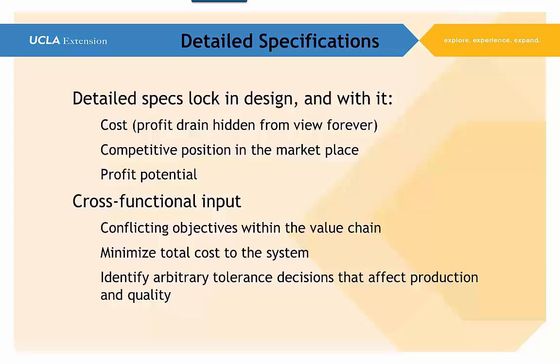What we need to do is make sure that if we're going to make any kind of decisions regarding production or quality or the service, for instance, a decision might be a specification. What we're putting together is a customer service system. We're writing software to put into some computers or mainframes. One of the specifications that we put in there is that if a customer service operator presses enter, in the worst case, the screen doesn't change for 2 seconds. That might be totally intolerable.